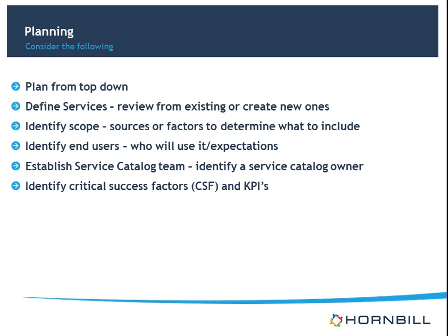The organization should also create a team that would be called the service catalogue team. The team would represent both viewpoints from IT and from the business. You should always allocate a user who would be the owner of the service catalogue and the main point of contact for the implementation, and also assign roles and responsibilities.